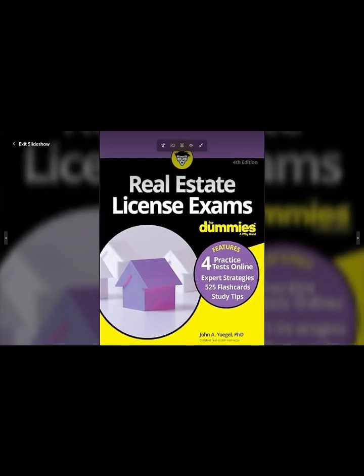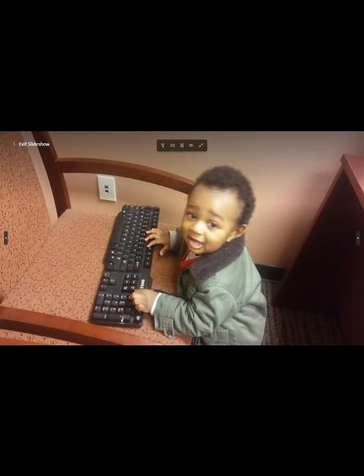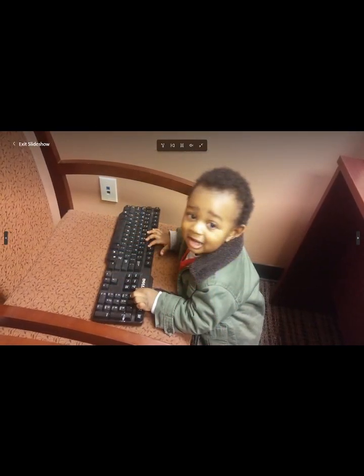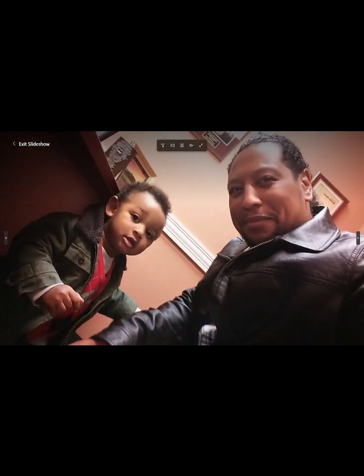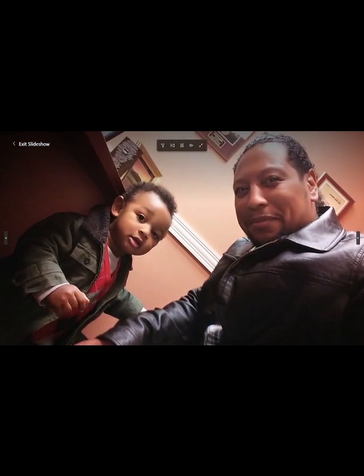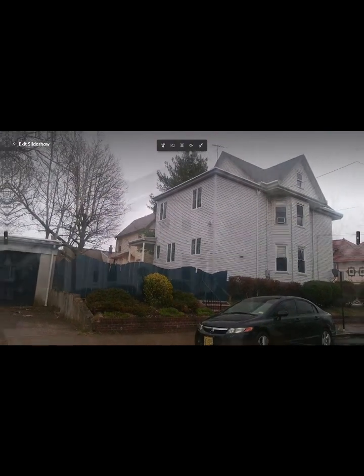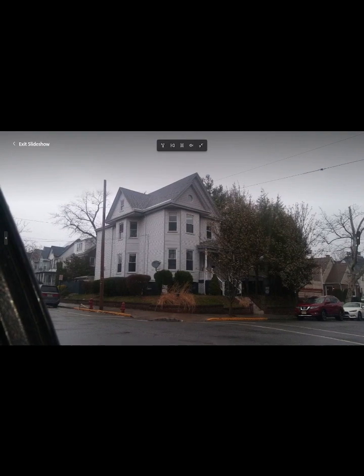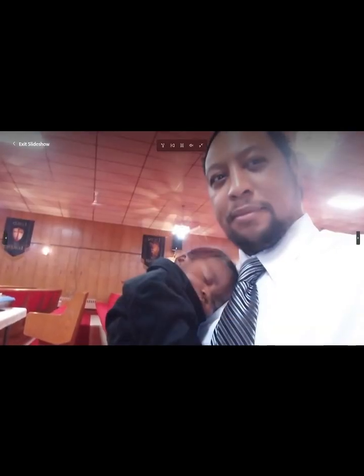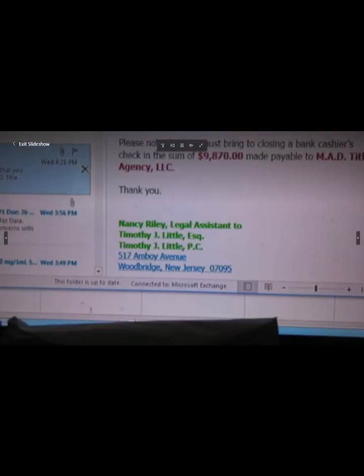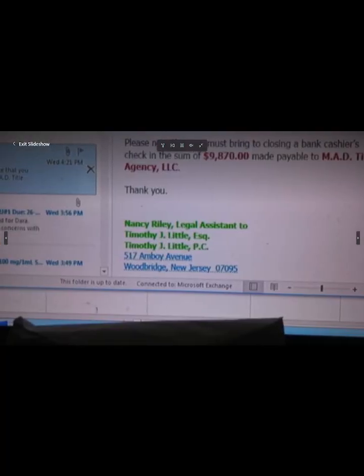Novation. Novation is a situation in which a new contract with different terms replaces the old one. A new contract can be between the same parties or between one of the parties to the original contract and a new party. Writing a new contract when only a minor change needs to be made is not a usual course of action. Each party usually just initials and dates the minor changes to specify their acceptance. Novation is reserved for major and more severe changes.